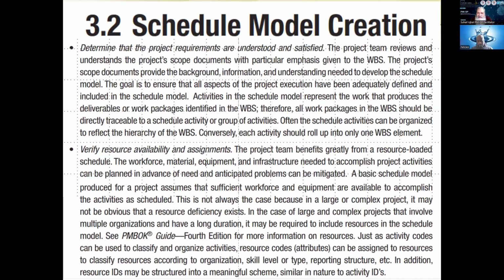Conversely, each activity should roll up into only one work breakdown element, meaning an activity cannot contribute to more than one work package. If this activity belongs to our work package, it cannot relate to any other work package, right? Second point is verify resource availability and assignments.